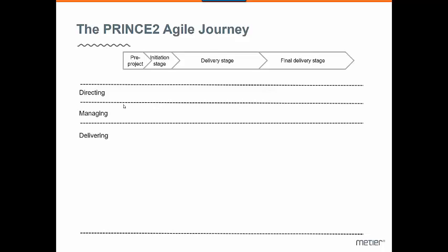Good. Now, the first thing you have to think about when applying this in a PRINCE2 Agile setting, an Agile project, is a time box. Starting up a project, you definitely want to set a time box for it when it kicks off. A lot of things can go wrong already here, and one of them is to let it drag out, right? But when you kick off, when you say, okay, we're going to look at starting this up, you set a time box.